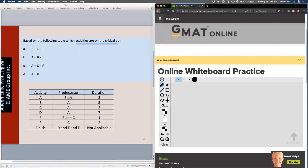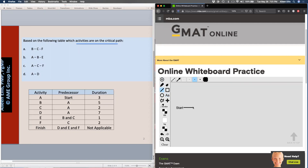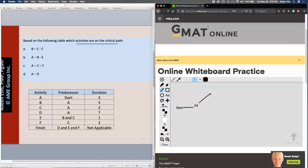I'm going to come over here, click on AA, and write 'Start.' Then I'm going to draw a line from Start — I can see Start is a predecessor only to A. So I'm going to put activity A here, and activity A is three days in duration. From here I see A is a predecessor to B, to C, and to D, which means I'm going to have three lines coming out of A.